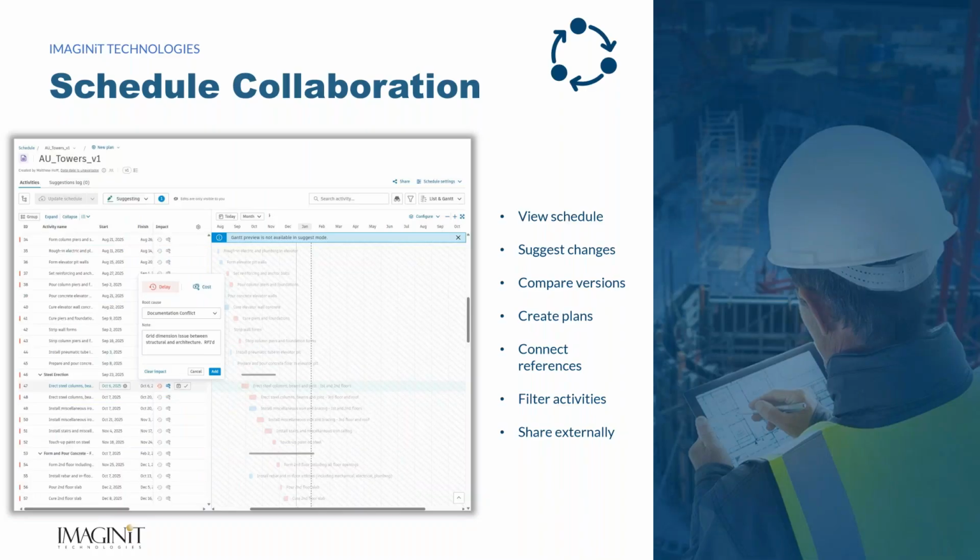suggestions and review it, right? And then if it's deemed that yes, the schedule does need to push, then they can go back through the Primavera P6 aspect and update that schedule and push a new version back, right? So you are using the schedule features to inform the real world situation and conditions that you're coming up against. And so again, compare versions, so understanding the differences between schedule iterations. You can add those references. So if it is a weather delay, a schedule impact because of an RFI, you can link that RFI to that schedule task to keep that contextual reference throughout the process.